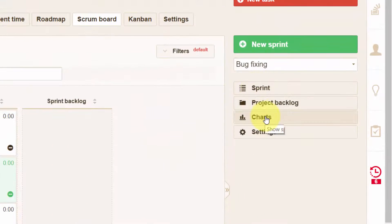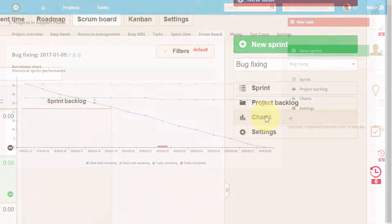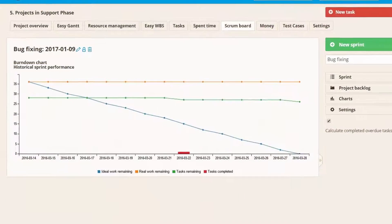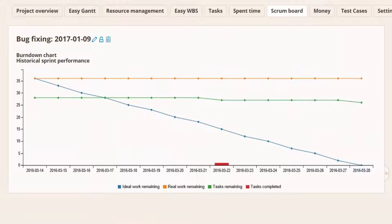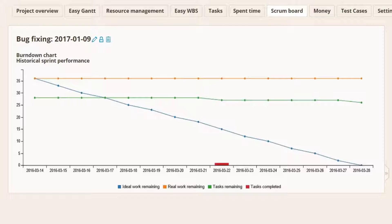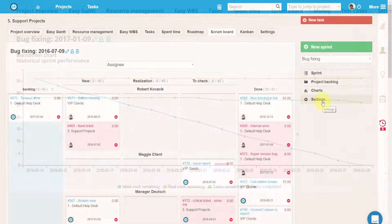Charts button shows you a burndown chart, which is a graphical representation of work left to do versus time. The outstanding work or backlog is often on the vertical axis with time along the horizontal. It's useful for predicting when all of the work will be completed.